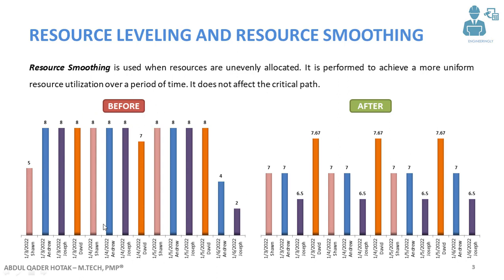Sean is working five hours here, eight hours here, and eight hours here. In resource smoothing, what we do is deduct one hour from the eight-hour days, which will result in seven hours of work here, seven hours here, and seven hours here.